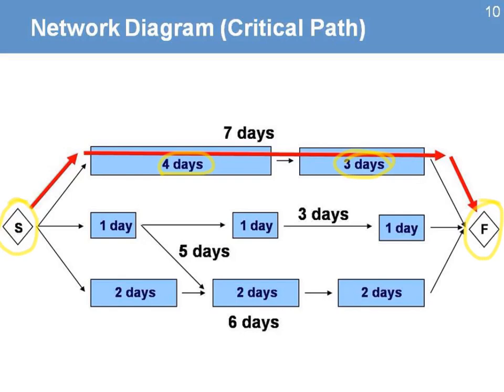And when we start looking at how they are connected, the dependencies, meaning that I first need to do this activity and then I do the next one and then I finish my work. In this other path, I begin my project, I spend 2 days on this work, and then I continue to the next activity for another 2 days, I go to the next activity for another few days, and then I complete that piece of work. So eventually you have a diagram with all the paths in your project from all the activities, and they're all connected with each other.